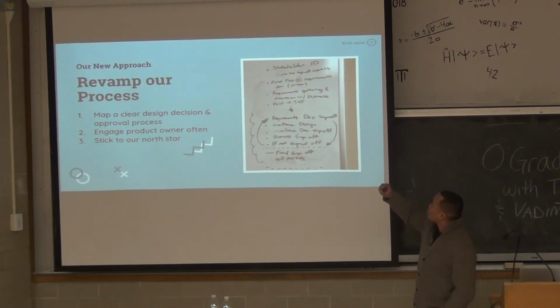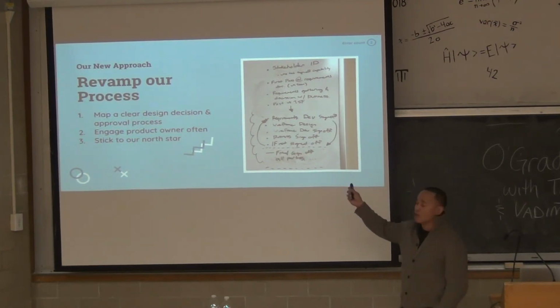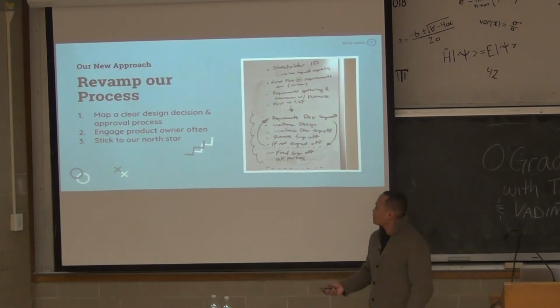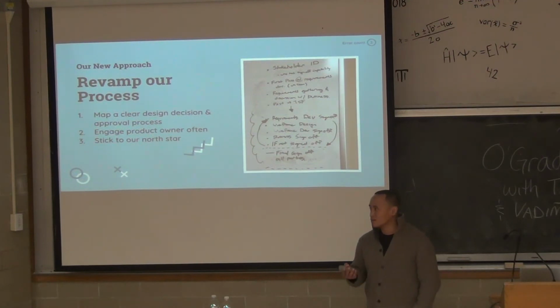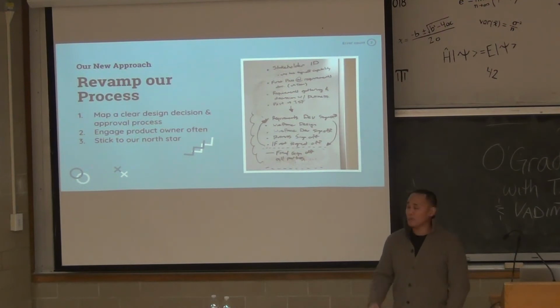It has getting sign off from business, it has getting sign off from technical, and then ultimately getting final sign off from all parties. Engage the product owner more often, again, mentioned that before, and then stick to our North Star. You know, our product owner had a very strong vision of what they wanted to see within their intranet, but we didn't want to lose sight that our users were ultimately our client, right? They were the ones that were going to use the intranet on a day-to-day basis. So we didn't want to lose that North Star.